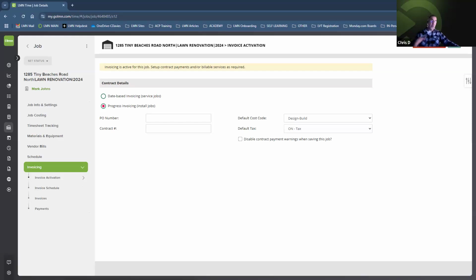So Brett, what you guys can do in your account to track shop time, or any internal time, is create a shop job in your account. The address or the customer will be you. So make sure that you're added into your CRM, or add yourselves to your CRM while you're doing it. Then just lay out the different tasks that you want to track time against. That's unproductive and unbillable. So keep that in mind when you guys are setting up a shop job in your account.